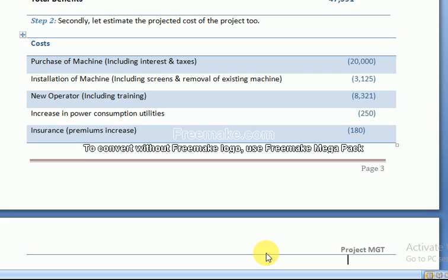Okay. So purchase of machinery: now we will purchase the new machinery. Clear? So when we purchase the new machinery, we will pay the price. Including all the tax, the price is $20,000. So this is a cost for us. And I took all the costs in brackets. Brackets means we will subtract it, minus. This is outflow, cash outflow.